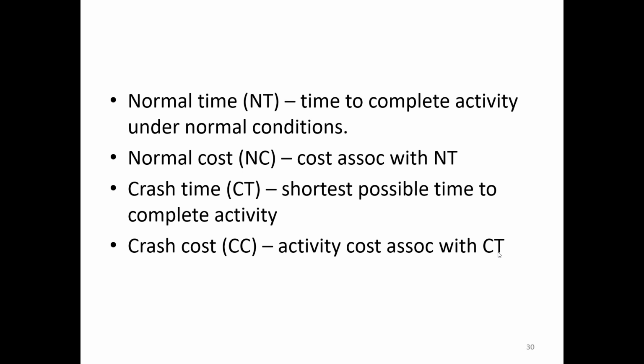You're pouring concrete. I mean, you could have cement truck after cement truck over there. You can have a zillion workers, but at the end of the day, the concrete has to cure, and that just takes a certain amount of time. Crash costing: how much does it cost to achieve that shortest period of time?